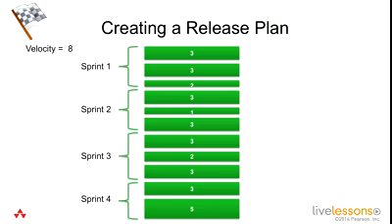our future sprints. So you can see here we're using a planning velocity of 8, and we see that we'll probably be done in about 4 sprints. Notice that in sprint 2, we actually have 7 story points rather than 8, because taking the 3 from sprint 3 would put us over our planning velocity of 8. We don't want to plan for anything we've never been able to do in the past. That's the empirical data part of it.